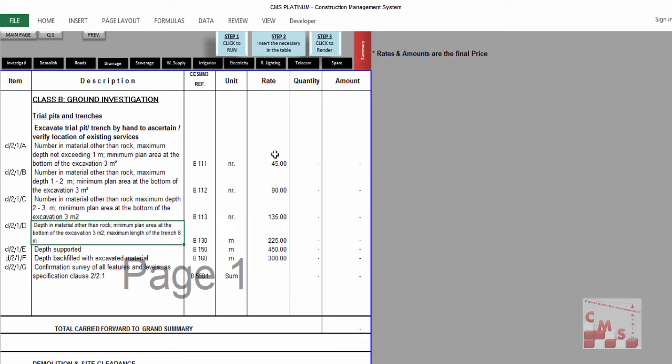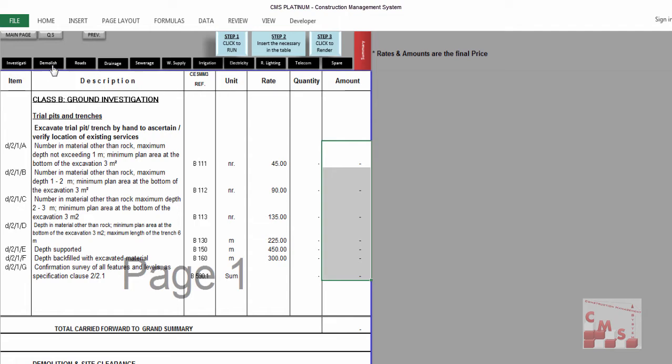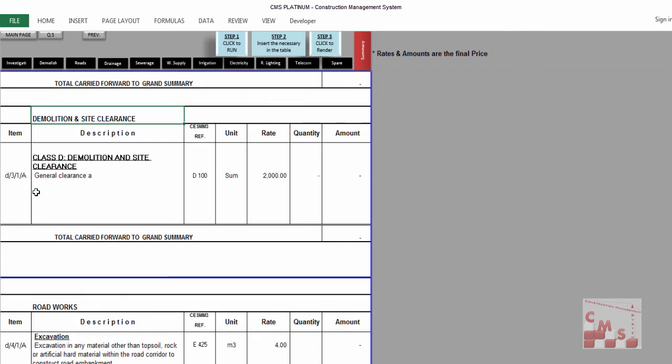You can change the rate according to the market rate and insert here the quantities accordingly. CMS will calculate the total amount for each division. The same will be in the other divisions like demolishing. You can insert according to whatever you need, add rows, and insert whatever you need to be calculated.